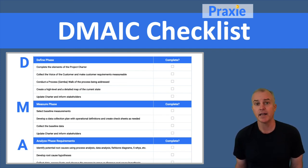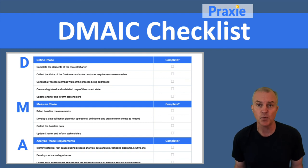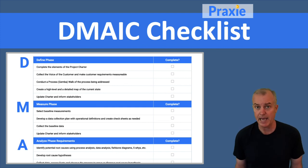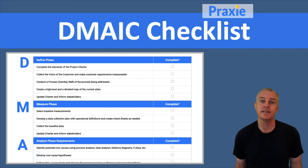So you have Define, Measure, Analyze, and Improve. Once you've made the changes, you want Control as the last stage. You want to create controls that allow you to put standards in place, documentation in place, and data collection methods in place, so that you can feed a dashboard and make sure you sustain the improvements that you made. The value of DMAIC is having a structured approach to guide you from one step to the next, covering all those critical items to make the best process improvements and have a successful project.